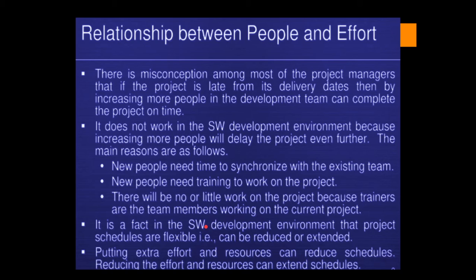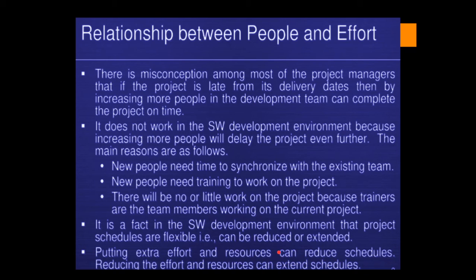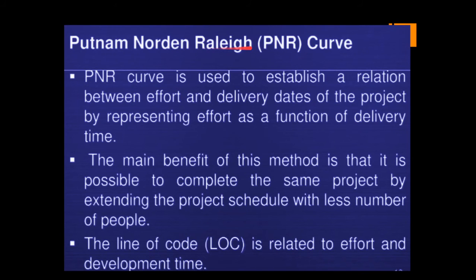In software development, project schedules are flexible — they can be reduced or extended. Putting extra effort and resources can reduce the schedule, and reducing effort and resources can extend it. That is what the study done by the Putnam-Norden-Rayleigh (PNR) curve shows. This PNR curve is used to establish a relationship between the effort and the delivery dates of the project by representing effort as a function of delivery time — focusing on how early the project can be delivered.